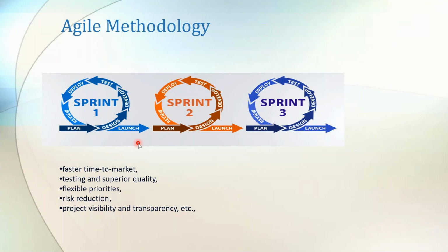If I take 6 months to make a small change and then come to know that the customer doesn't like the feature, then again I have to wait 6 months to remove the feature. So 1 year of time I'm wasting on those small changes. To avoid it, we came into the sprint concept, the agile methodology, where we have a group of people.